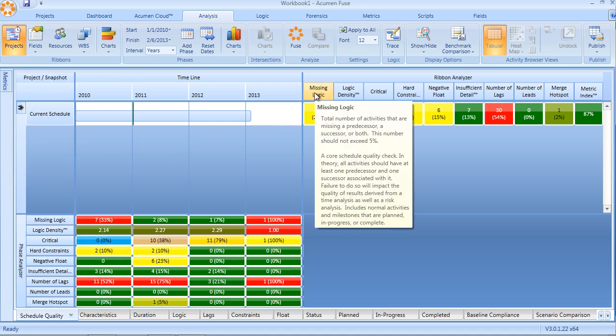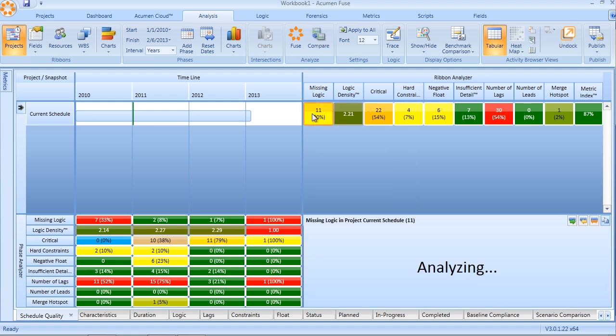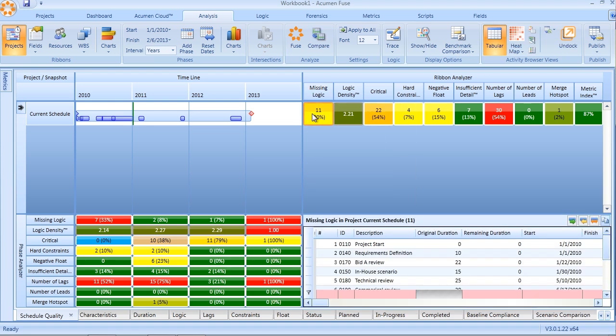Missing logic is a metric that looks at the number of activities that have either missing predecessors or missing successors, often known as open-ended or missing logic. This is a very effective means of pinpointing those activities, identifying them in the activity browser as we can see here in the bottom right corner, and then ultimately going back to the schedule and resolving those open-ends.